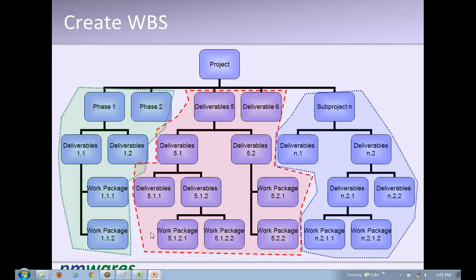I mean to say, if a work package is too big, in one review cycle the progress will be like 5%, 2%, 3% or 10%, which will be difficult to measure. But if you break it into smaller pieces, when you have a review cycle of 1 week, then every progress is like 25% or 50%. Like I have a work package of 2 weeks. It means after 1 week it should be 50% complete.